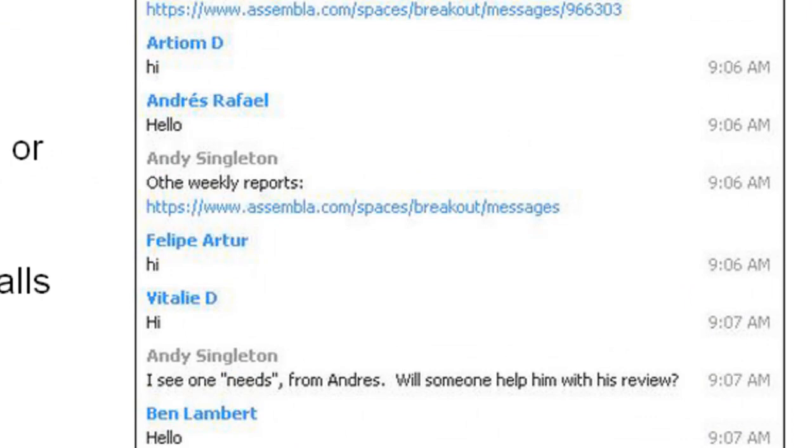And there's a few simple rules that will make this easy for them and will allow you to get the information you need without interrupting their work. The first rule is to always have it at a fixed time. If you move the time around, it will be hard for people to adapt and they'll miss the chat. The second rule is to every day do a 10-minute Scrum or stand-up meeting.